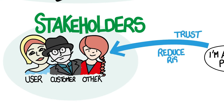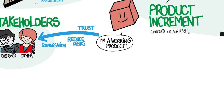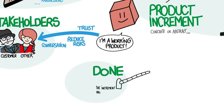Direct interaction with stakeholders builds trust and reduces market risk — that is, it increases the likelihood that the product will be a success. With a working product in hand you can have good conversations about what you have, what changes are needed, and how best to move forward. You can also identify work to delay or skip entirely, saving both time and money. This is possible because each product increment works — it is done.